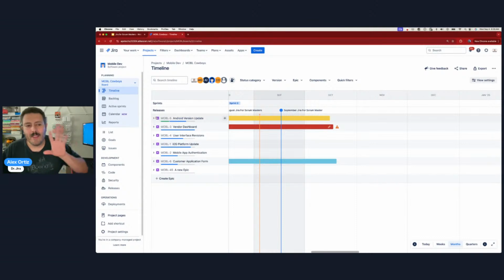Number one, you have the ability to basically create and define epics. Now, this is pretty important because epics are really the highest tier, at least if you're on the standard and free versions of Jira, the highest tier that you can start defining things, okay? And so when you're looking at a project or a big deliverable, and you have to start breaking it down into capabilities, functionality, maybe even features, right? The epic is where it's at.